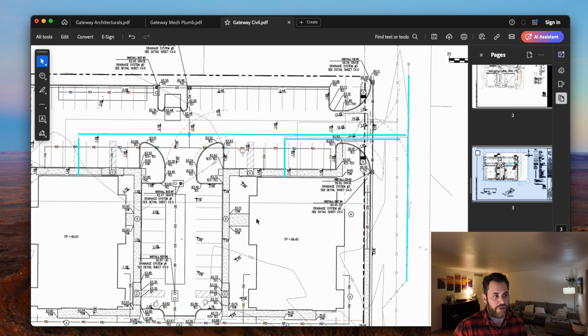And then when we get into the building, looking at the plumbing drawings, it'll shed more light on this. But one thing that I would bring up for this activity is we have two intersections into the main line for the water. I'm not sure why we wouldn't have two. I want to reduce the frequency of hot taps because I would assume this is city water. They're not going to shut it off, because I would shut water off downstream for other tenants or other people with buildings downstream of this one.